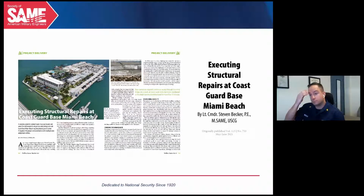Second, the Coast Guard lacked a real property interest to any laydown, staging, or construction work area at the head of the bridge. Third, construction on a neighboring ferry terminal and parking garage was scheduled to commence in 2019 and continue into 2020. The two major projects would likely be competing for the same laydown and work areas, making coordination between federal and commercial entities imperative. To overcome these challenges, careful construction phasing and coordination with multiple state and private entities was required.